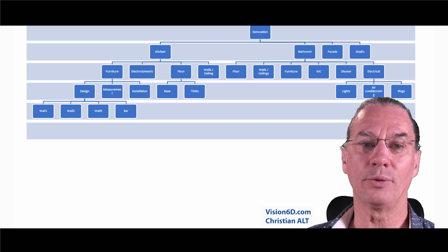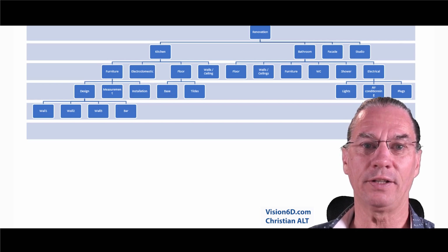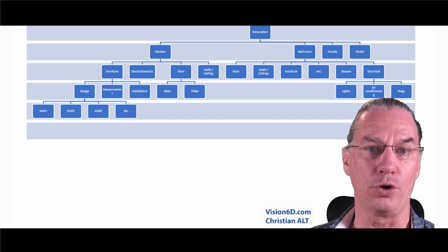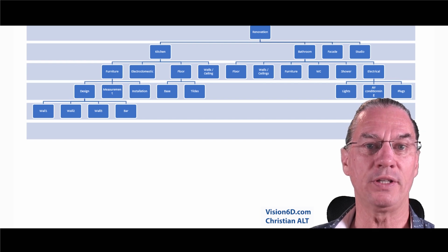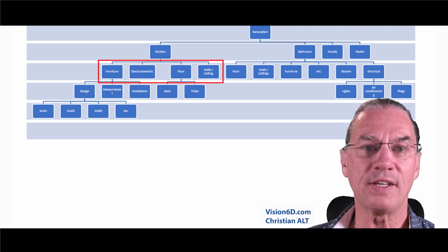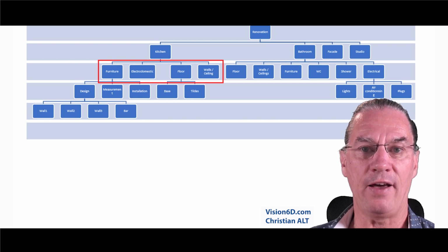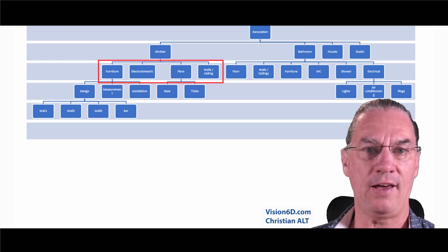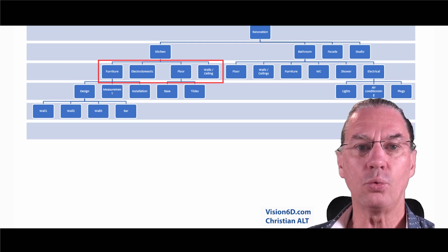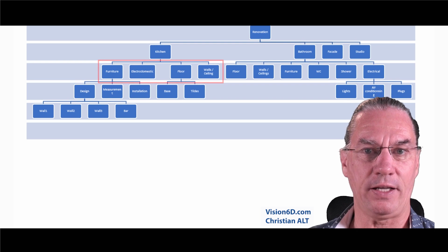Now we broke down a bit more the project. You see that we've defined the kitchen, we've defined the bathroom, and I haven't expanded the facade and the studio, but they are also integrated with WBS. So let's give a closer look at what will compose the kitchen. We'll have furniture, we'll have electrodomestic, we'll have the floors, and we'll have walls and ceilings.